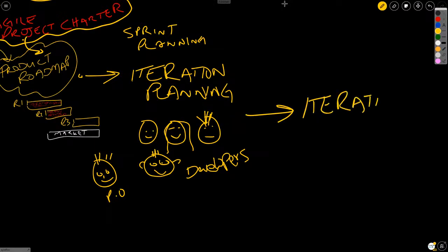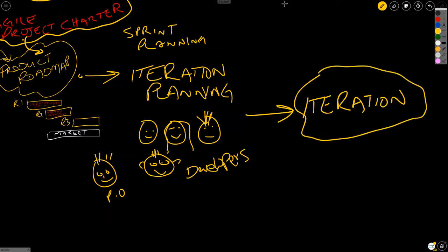And this is where the team is doing the work. Remember that to get into the iteration, your stories, every sprint, have to meet the INVEST acronym, the definition of ready, right? So they have to be ready to work on. And what does INVEST mean? Independent, negotiable, valuable, estimable, small enough to fit within a sprint, and testable.